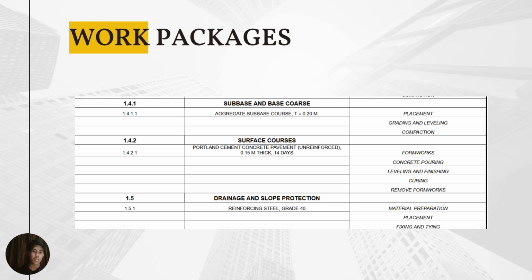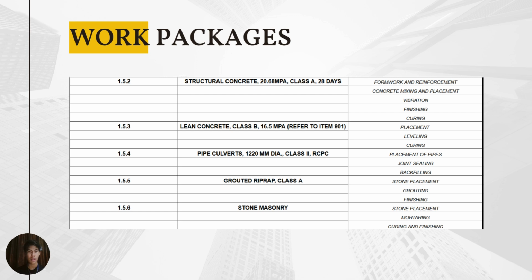Next is drainage and slope protection. Including here is the reinforcing steel, which is grade 40: material preparation, placement, fixing, and tying. Next is structural concrete, class A. We have here formwork and reinforcement, concrete mixing and placement, vibration, finishing, and curing. For lean concrete, we have placement, leveling, and curing.